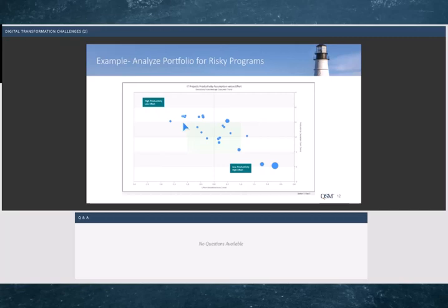So high productivity, lower cost. And then these down here, I didn't give myself enough credit. I assumed too low of a productivity, so the costs are a little bit higher, and therefore they're outside the historical data range as well. So these projects, we'd probably want to take a second look when we're trying to plan the whole transformation. Each one of these is a release or a project or a product delivery within the digital transformation. Now we're looking at the big picture to see which estimates look good, so we can move forward with confidence.